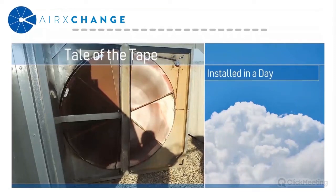Both units were installed in a day, and it required no assembly on site. So the project went by really quickly. Essentially, they slid the old one out, slid the new one in, installed a bit of sheet metal flashing, and wired it up, and it was good to go.